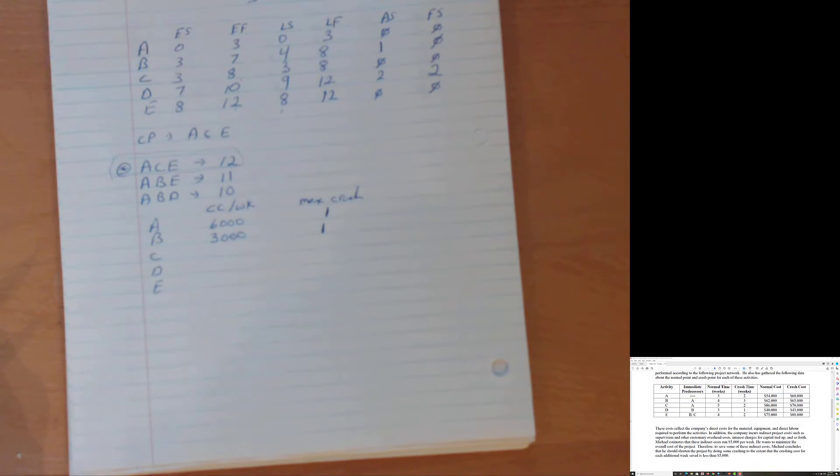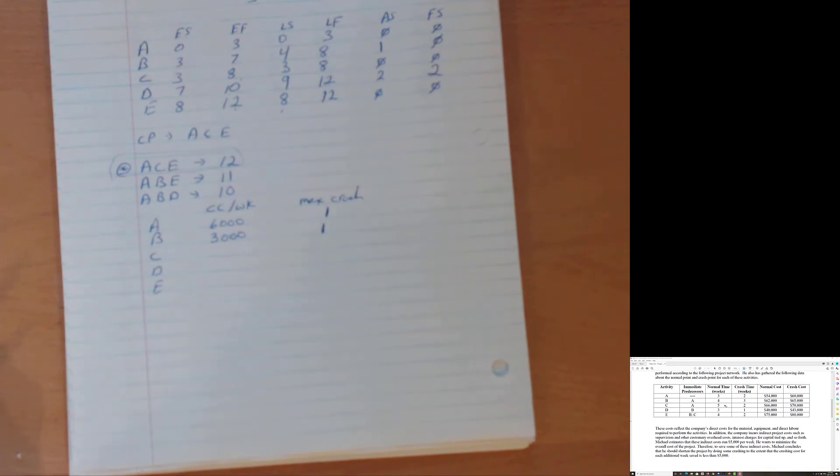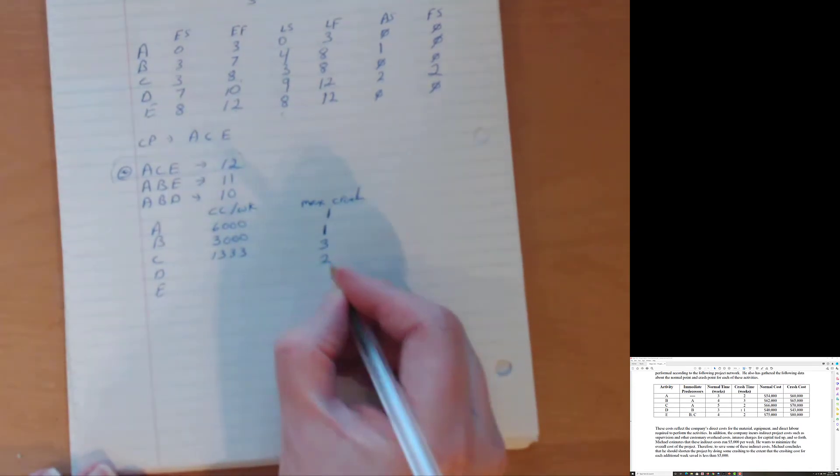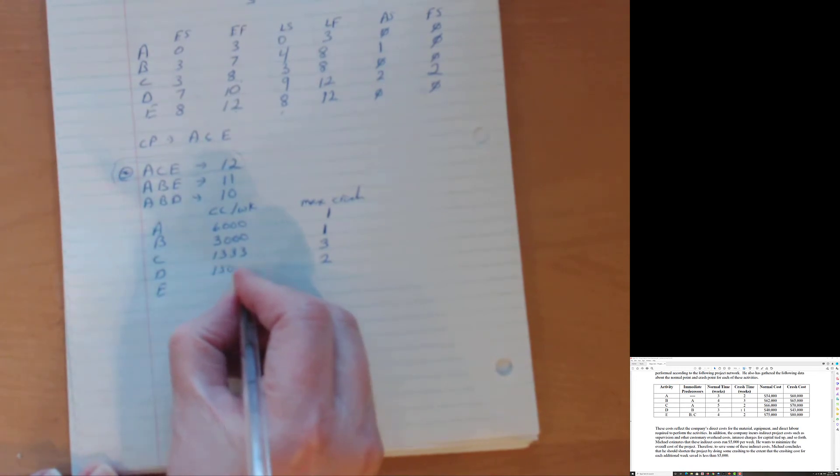We can crash in a total of three weeks, five minus two. So we'll crash it for three weeks. And then we take that 4,000 divided by three and we get $1,333. D 43,000 in the crash cost minus a 40,000 normal cost divided by three minus two, because you can crash a total of two weeks. So 3,000 divided by two and D costs $1,500 per week to crash.